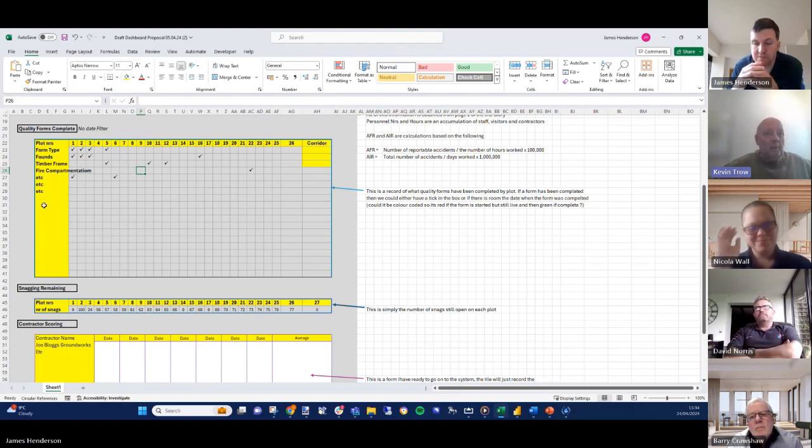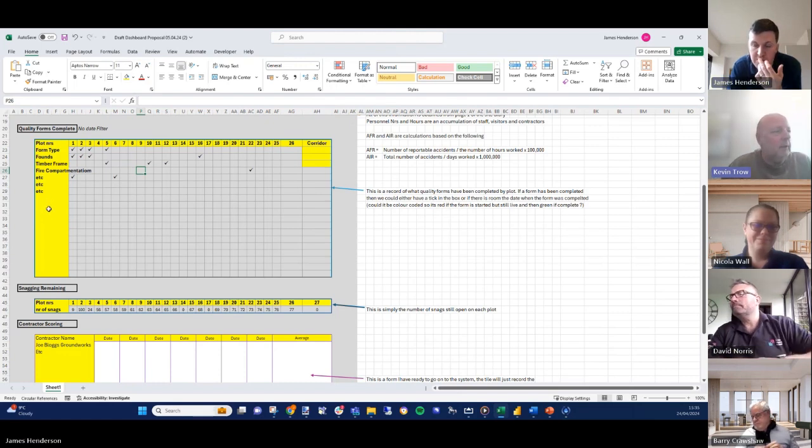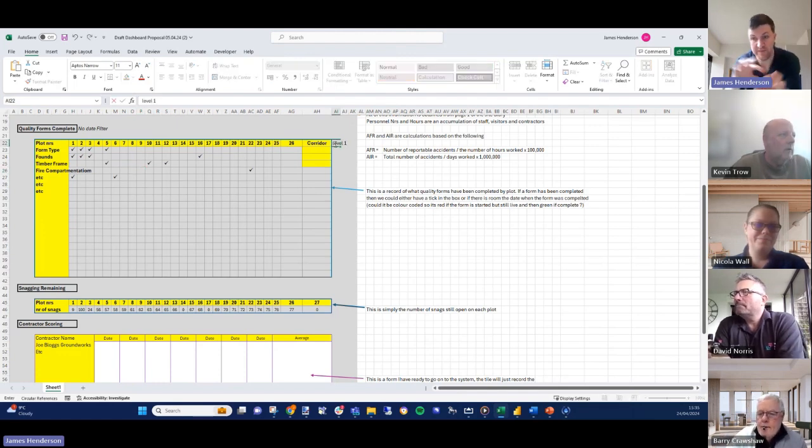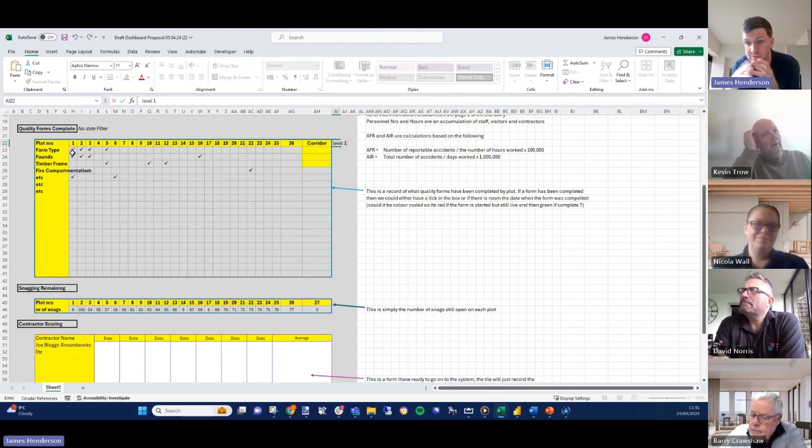But on an apartment block, we could set up front elevation, side elevation, and if we wanted brickwork checks, you would filter those brickwork checks out. Yeah, okay. Some projects do that, and then they would have, like I've got corridor here, level 1 and then level 2 if you're going to be signing off your checks per level on the north elevation. So you'd have your cladding sign off, your brickwork sign off, etc. It's definitely a completely different sequence to what's going on in the plots. But yeah, you could have sequences for everywhere that you're inspecting, even external works and drainage if you wanted.